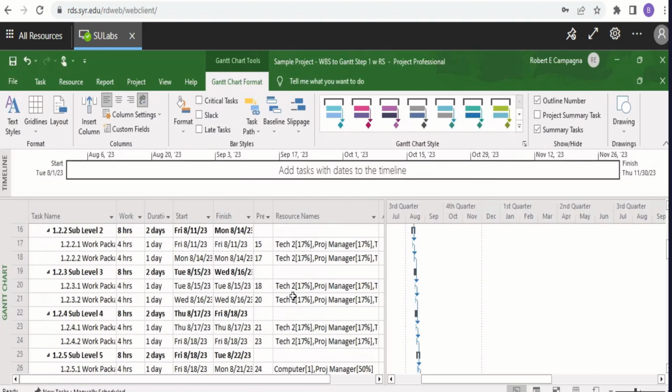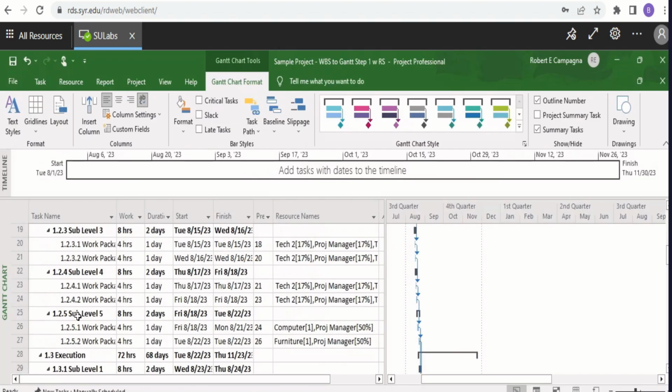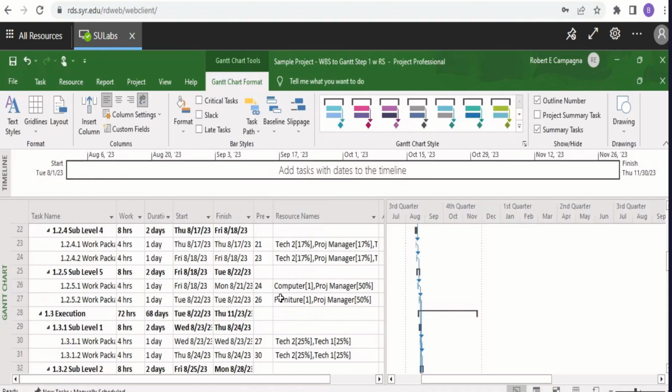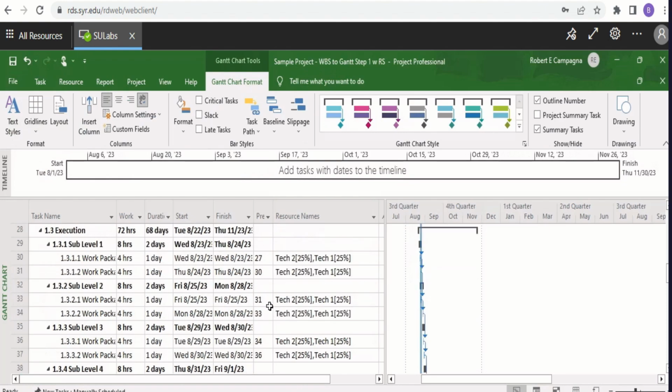So in the planning phase, you remember we entered the materials here. The project manager was ordering the materials. And this 1 designates the quantity. So the software will automatically multiply the quantity times the cost that we put in the resource sheet to give us the total. But there must be another instance of material since we've double counted somehow.